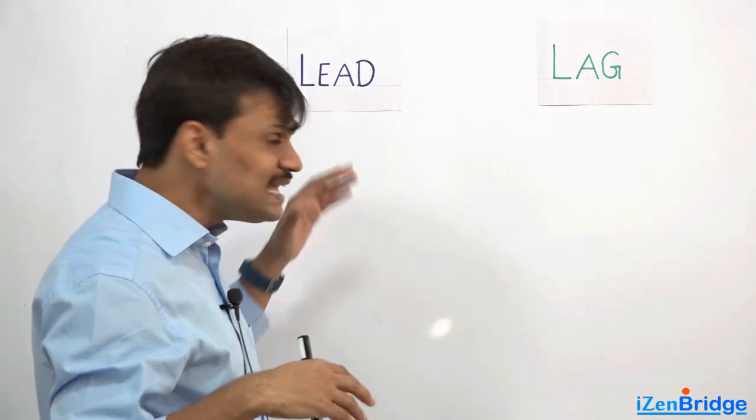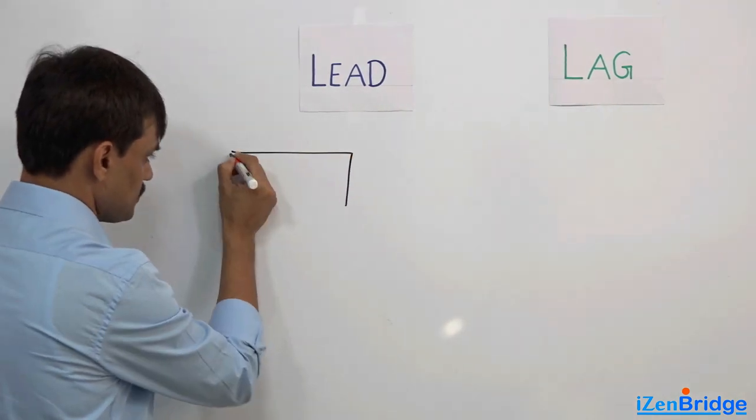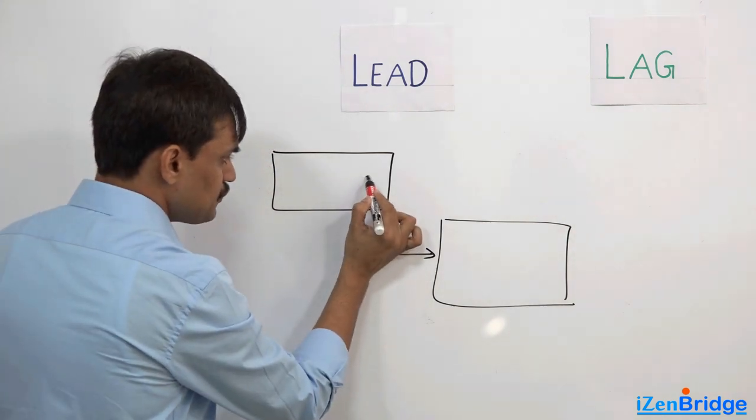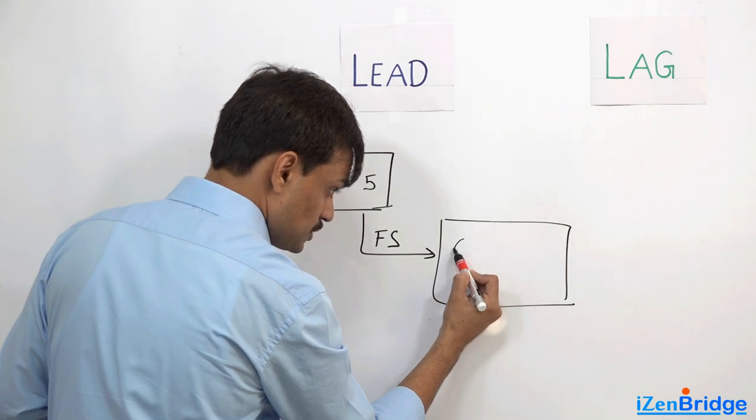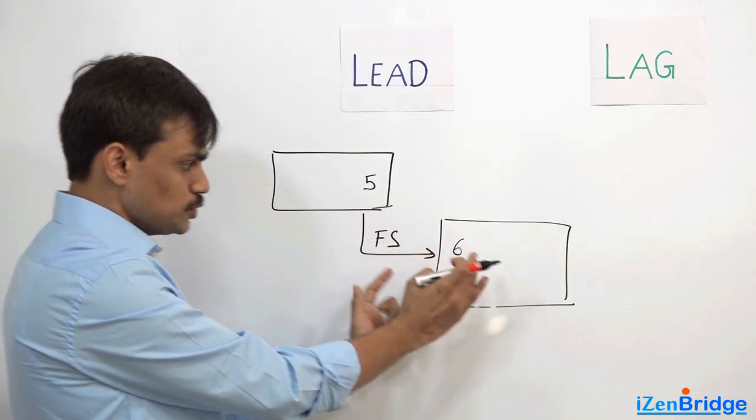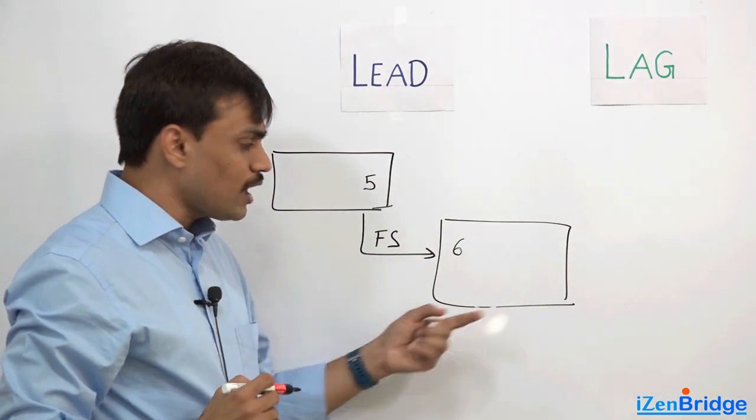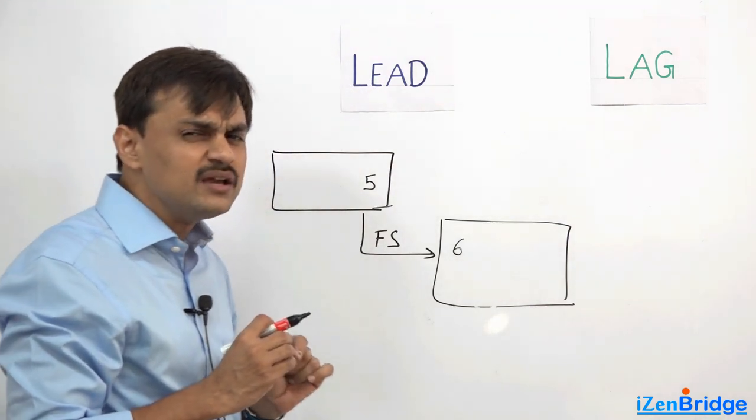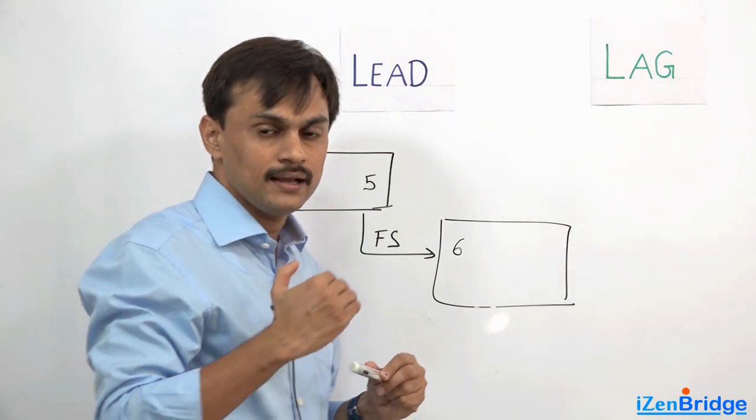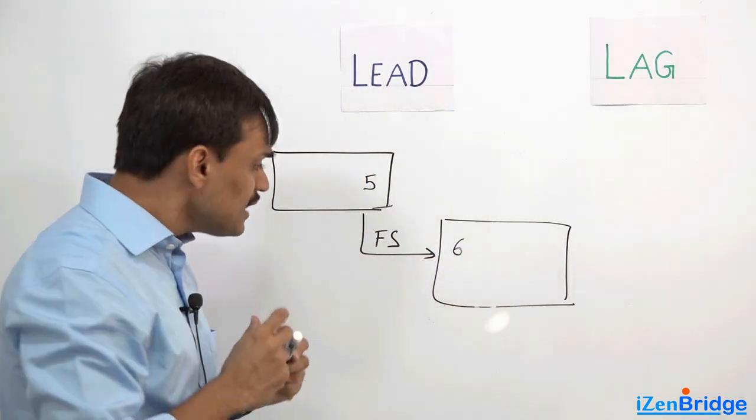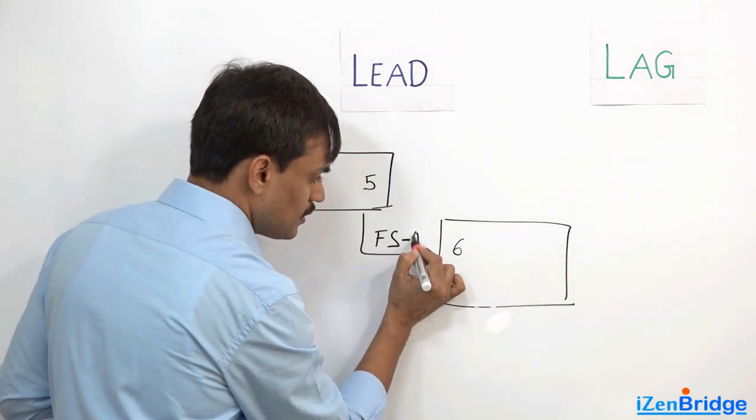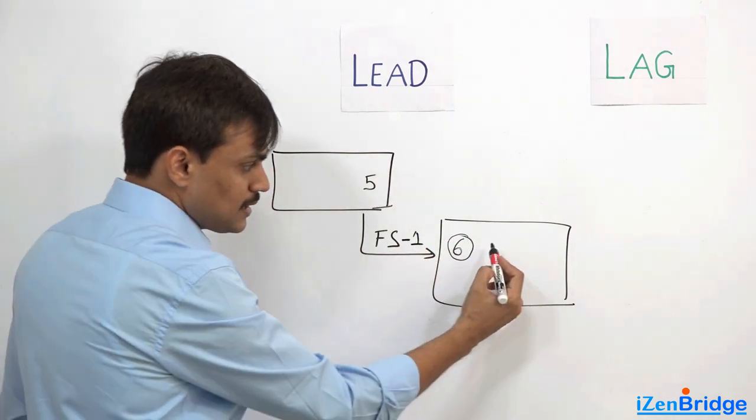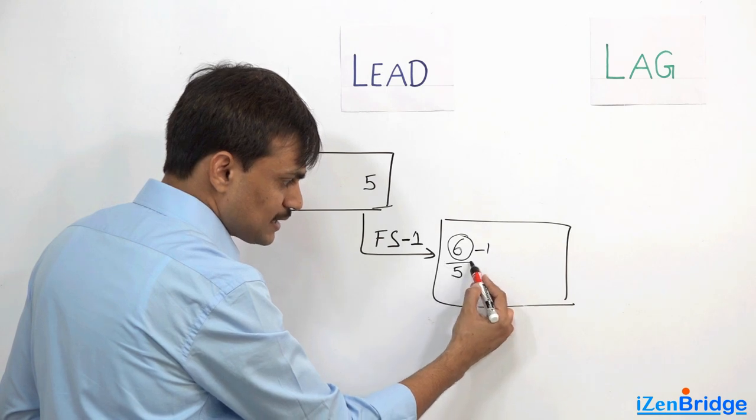When I say lead for a given relation, there are two activities linked with finish to start. This activity is finishing on day five and this activity is expected to start on day six because finish to start - when I finish, you start. Simple. Now you may want to have this activity maintain this relationship but a little bit ahead, means it should be running one day in parallel. It should be led by one day. So if I write FS minus one, it shows that it is leading by one day. If its estimated time is coming six, I need to put a minus one here and my estimated start time will become five.